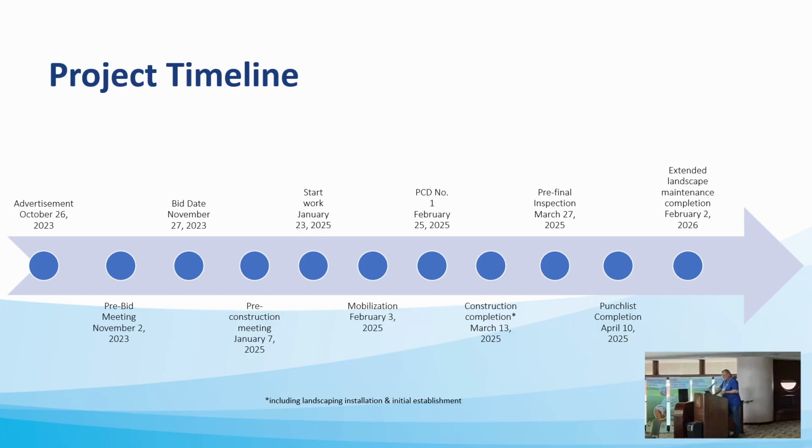Moving on to project timeline, actual construction time for this project was between February 3rd and March 13th, including landscaping installation and establishment. Currently, we are in the ongoing extended landscape maintenance period. Here's a short video of the project progress during its construction.